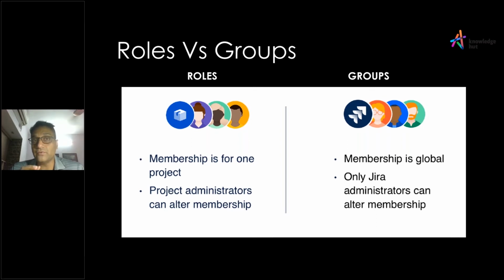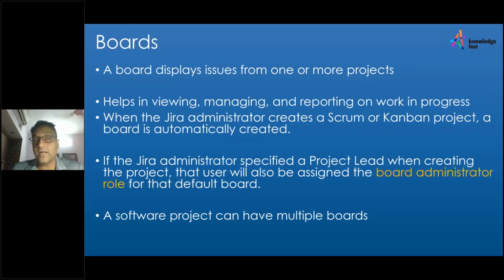But the problem is, if you give those permissions to a group, the group may have the same delete permissions across all different projects, even the ones which they are not associated with. And that's one of the things, so you need to be a bit careful in terms of using roles versus groups. In my opinion, roles work perfectly well when it comes to at least one team, and all such things.